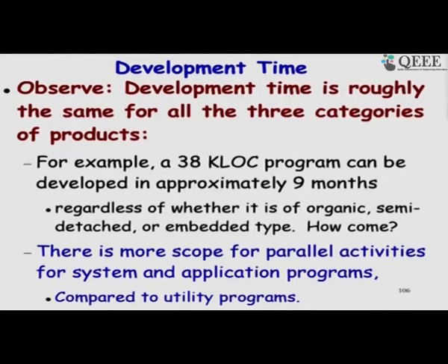But then the project managers kept on using the same estimation models throughout the development cycle. So, first they would estimate during requirements, get a very rough estimate, and as the development progresses, use the same expressions, but then they have a better understanding of the software, and they can get more accurate results as the development proceeds and change their plan accordingly.